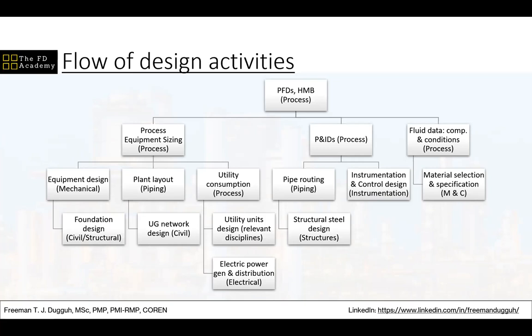So this third stage model review, you perform it at the point where almost all engineering work has been completed, almost all. But I cannot say that it marks the complete end of engineering. No. So the end of detail engineering design, I'm not sure there is a specific end, because even when you start construction, some engineering is ongoing. The civil guys might be at site performing some construction work and so on, but some engineering work might still be ongoing. It might still not be completed yet.